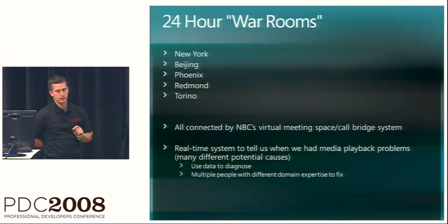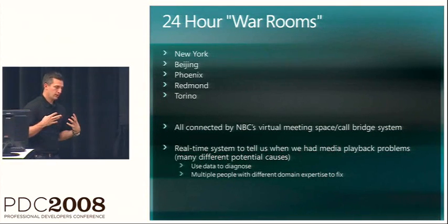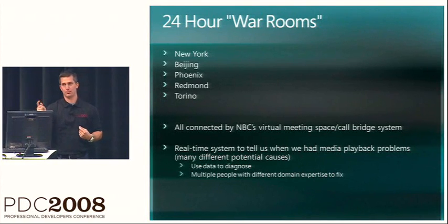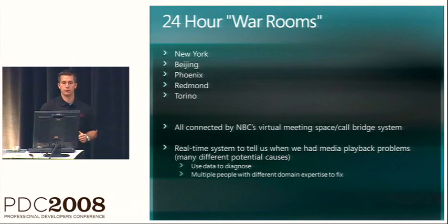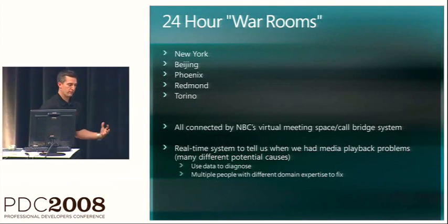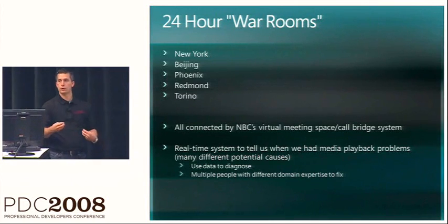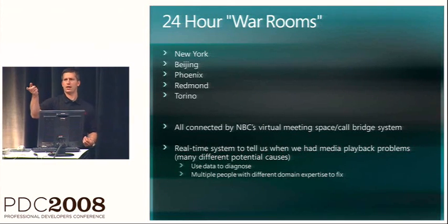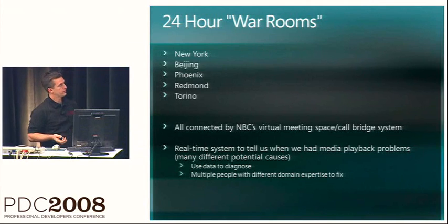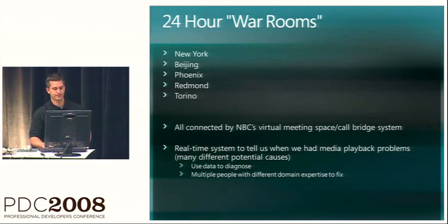And the interesting thing, and this was a lesson that we learned, was we had all these people, and we never ran into a problem that we couldn't solve, number one. Sometimes it took longer than we wanted to. We had all these real-time systems, but given the amount of people and just the geographic distribution, sometimes certain people didn't know what other people were doing. They knew that Bob works on advertising, but really didn't know all of Bob's workflow. So if we're trying to triage and he didn't understand what Bob did, it took longer to get done.